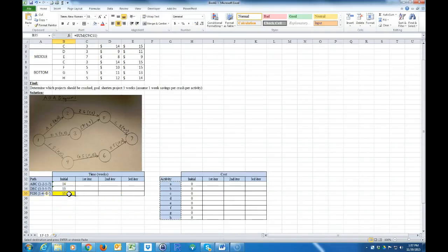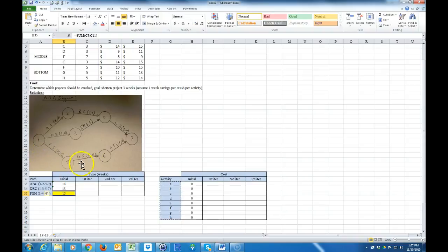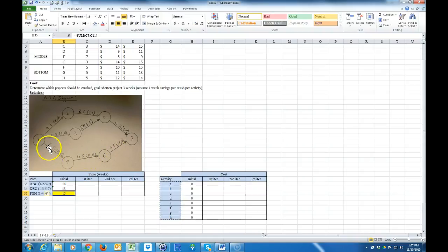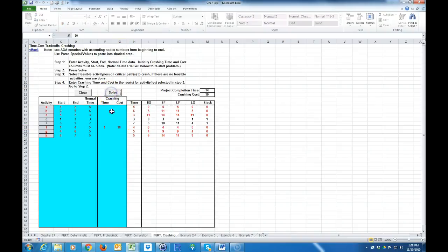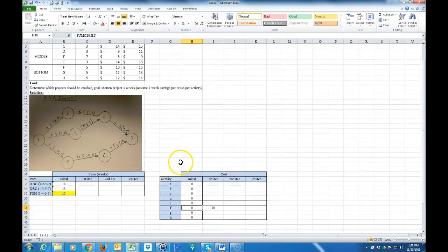I can crash activity F for $10, G for $11, or H for $12. Which one's the cheapest? Since we're trying to minimize cost, we crash activity F for $10. So I go to activity F, reduce it by 1, cost is 10, and hit Solve. That lowers the project to 14 weeks. I didn't do anything on the top or middle paths, so those still take 14 and 13 weeks.